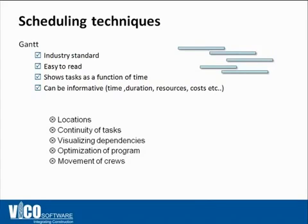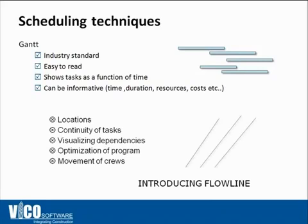Gantt charts don't show locations. For example, they show locations only in the name of the task if you include it, or if you create your own location breakdown structure coding system and include it as a field in your Gantt chart schedule. So it doesn't show continuity of tasks, and it does not allow you to visualize dependencies and optimize the movement of crews.